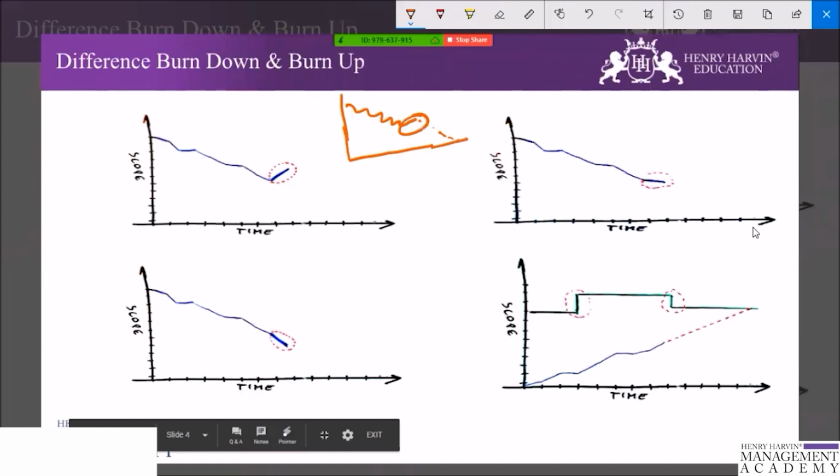So in a basic burn down chart, it is a simple graph showing the amount of work on the vertical axis and a timeline on the horizontal axis. As time progresses, we keep track of how much work is still not done, and the goal is to hit the ground, that is, how soon we can hit the ground here. The steepness of the curve can help us approximate when it's going to happen, or in other words, when we are going to be done with the whole work. And when we think about quantifying work, it can be anything we use, a story point, weighted t-shirt size, or the simple number of tasks that you have done.